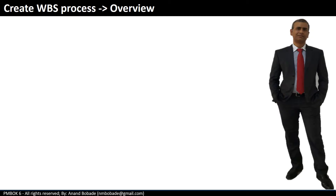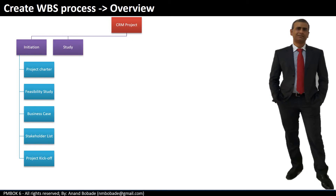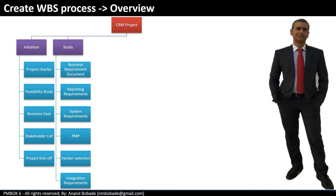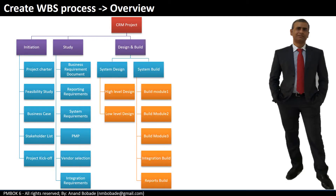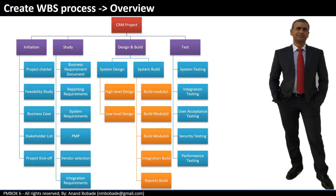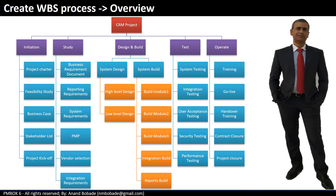Let's take a look at WBS in the picture. This is a WBS for a CRM project — CRM stands for customer relationship management — decomposed based upon project phases. The initiation phase has a project charter, feasibility, and business case. In the study phase, detailed requirement gathering and planning is done. In design and build, system design is done and the system is progressively built, with the complete build divided into five modules. In the testing phase, the system goes through system testing, integration testing, and business acceptance. Finally, in the operate phase, user manuals are prepared, training is given, and the application is handed over to the operations team.